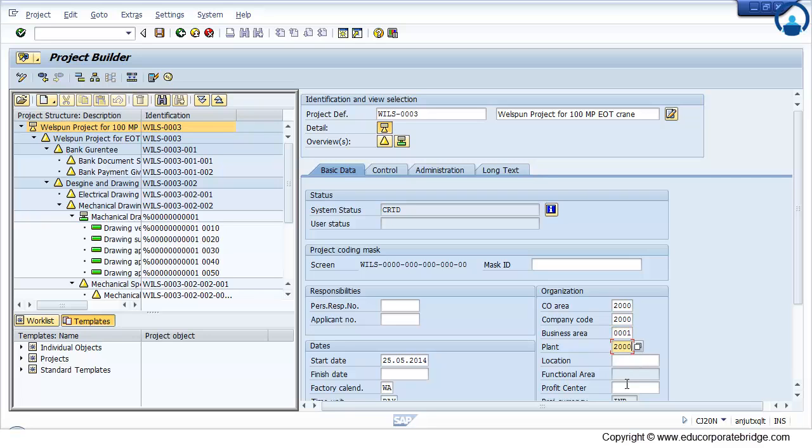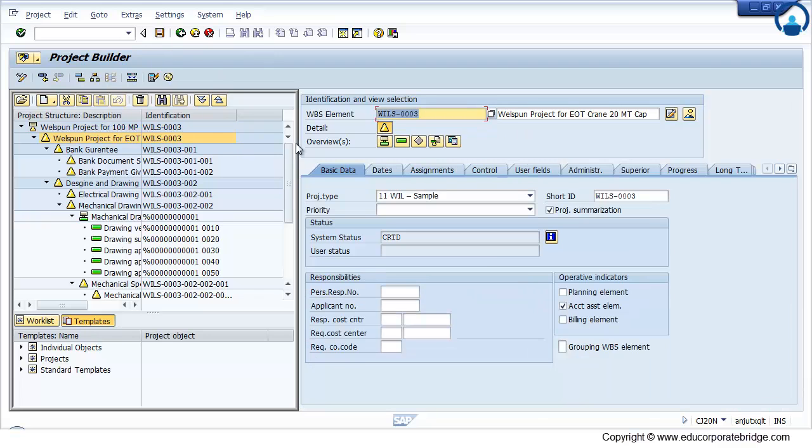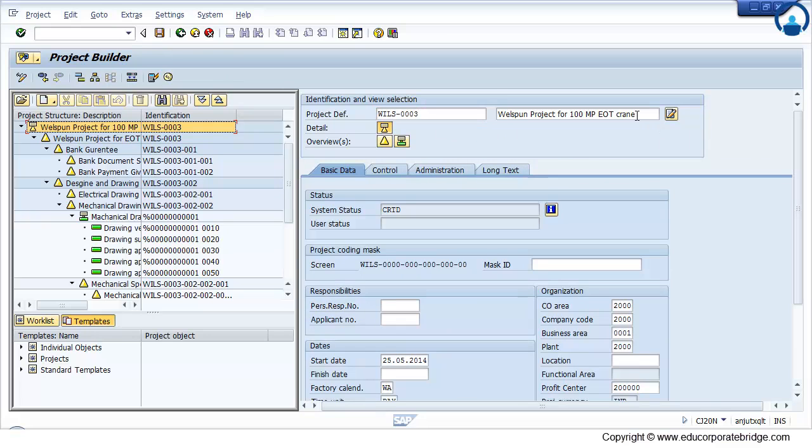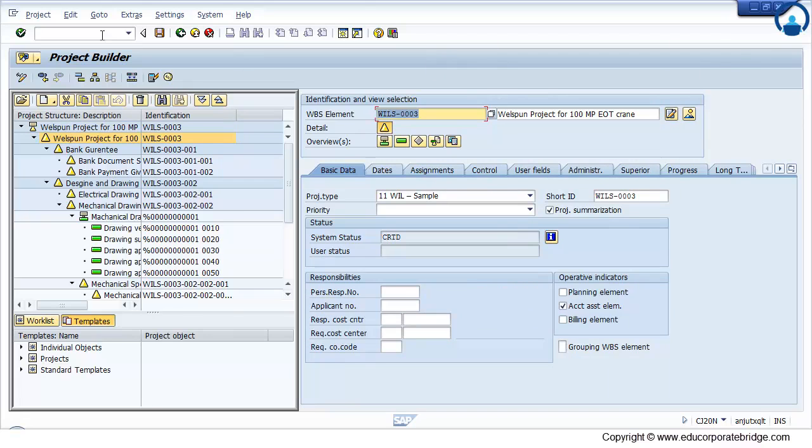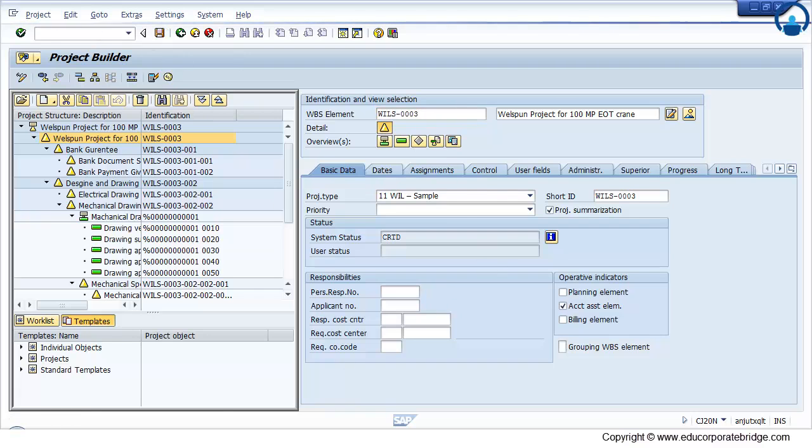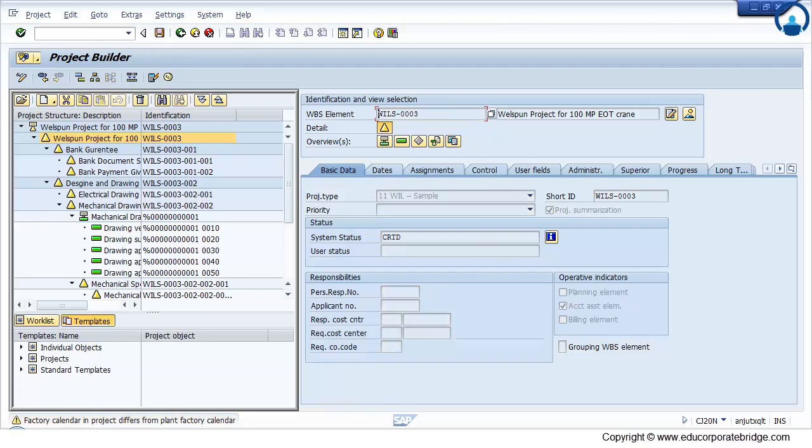You need to maintain the plant, profit center, business area, change the description, and finally save. So you can copy from the operative project to operative project.